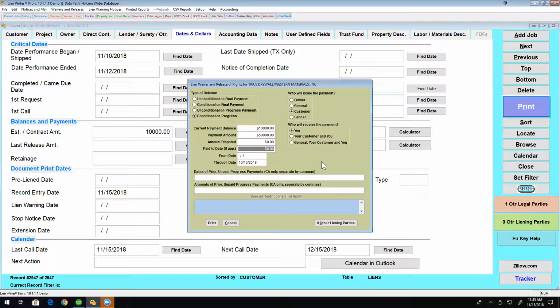All right, a spoiler for California customers also, okay? California, back in 2012, came up with this brilliant idea that you've got to name any unpaid releases in your system that you haven't been paid before. So you would say something like, okay, I've got one for 10/10/2018 for $4,000 that I didn't get paid.